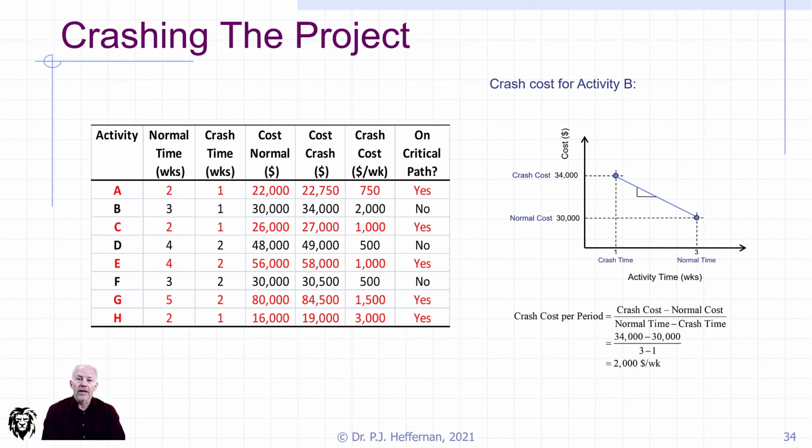To be fair, normally we annotate the tasks, which ones are a linear extrapolation and can be crashed in increments other than the one that's described. But for many of them, they actually just represent discrete options. We can do it this way or we can do it that way. And so you have to recognize those limitations in making your choices.